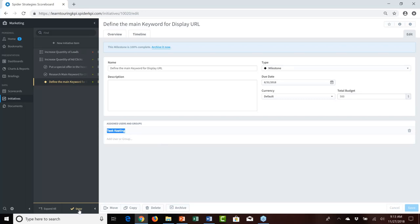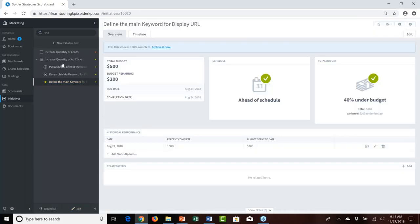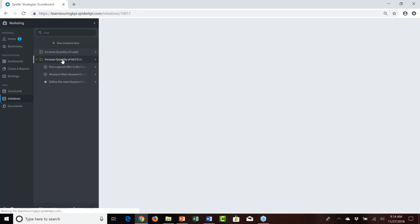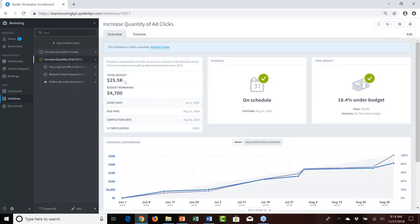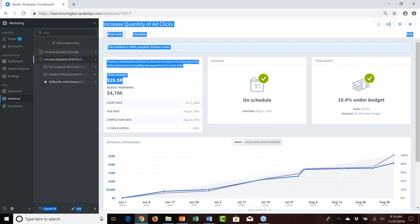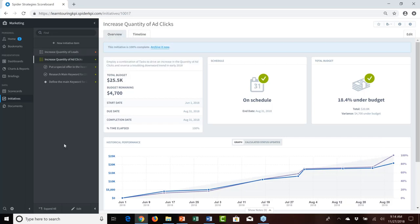After viewing the setup, jumping out of edit mode and clicking on the increase quantity of ads initiative, you'll see it has a total budget of $25,500 — because the tasks and milestone automatically roll up into the parent initiative. That's why we didn't need to define its own start date, end dates, and budget separately.